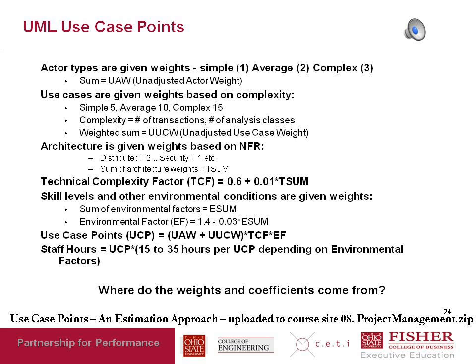Now you might ask, in this use case points approach, where do the weights and coefficients come from? And to answer that, I point you back to an earlier slide when I said all this comes from internally collected data. So you collect data and you perform regression analysis to figure out what these coefficients and so on are.